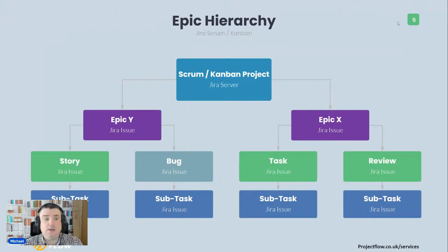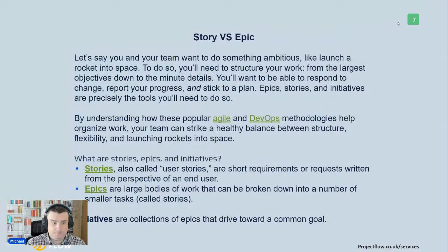And of course, if we're using agile project management, the structure is, let's say, a little different, but it is still referring to this main principle, so that project is always on the top. However, if we're using Scrum or Kanban, the epic is going to be on the top, and we can achieve somehow an artificial, let's say, third level. But again, as you can very clearly see, we've got epics. An epic can be linked to a story, which is the smallest body of work, and the story can be linked to the subtask, and that is really it. We're gonna keep that as it is.